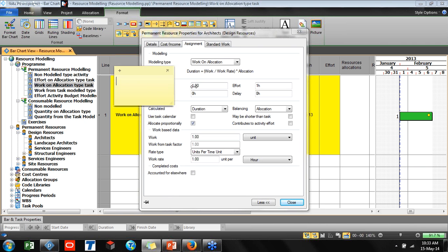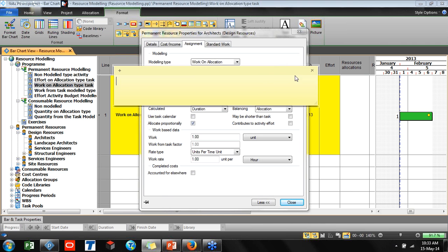and maybe seeing too many things can make it complex for you. Okay, now the system will calculate the duration for me, and when I change the duration of my task, it will change the allocation number of people. And here we have options like rate type. We say productivity rate, the amount of work performed in a particular time, so we will know our capacity.